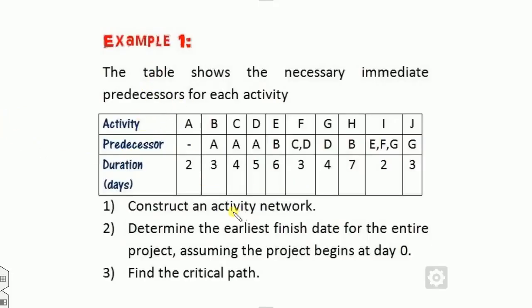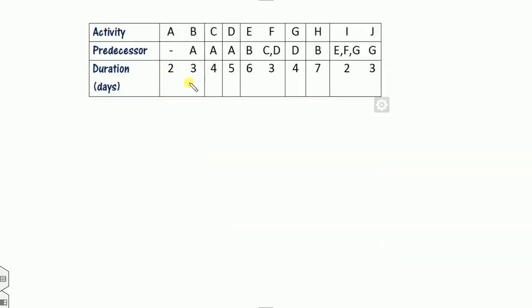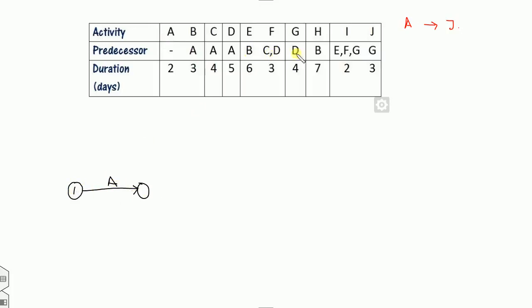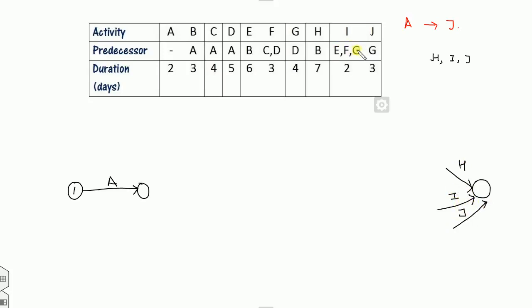Example 1: Activities A to J are given. Firstly, construct the network. Since A has no predecessor (dash), A is the starting point. Looking at which activities are missing from the predecessor column — H, I, and J are not present — so the ending point has three terminal activities: H, I, and J. Once A is completed, B, C, and D start.